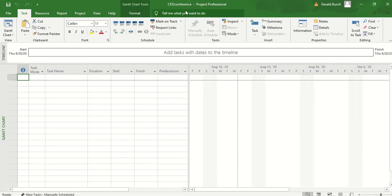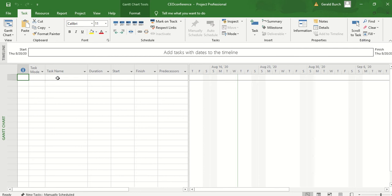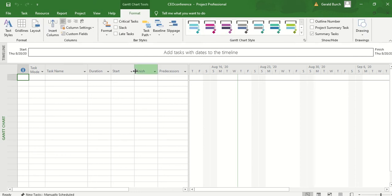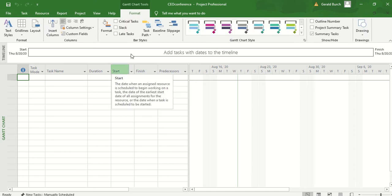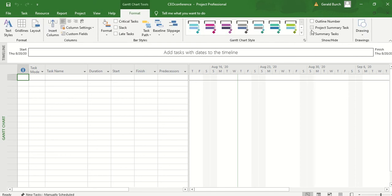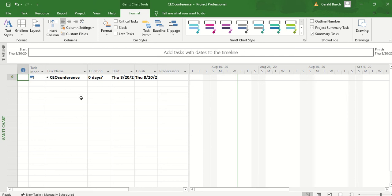Once that's done, you'll see up here on the top that this says CEO project, and we're ready to start rolling. Next thing that you want to do is see here on line zero, there is nothing in there right now, and you want to be able to get the project summary to pop up in here. What I want you to do is look up into the format tab, and in the format tab, once you're in here, come over and click on project summary task, and when you click on project summary task, it will now say that your project summary CEO conference is in here listed the way that you want it to.